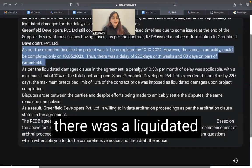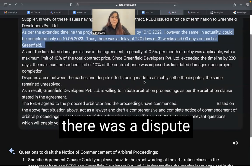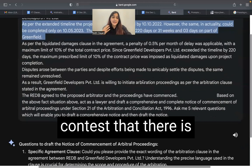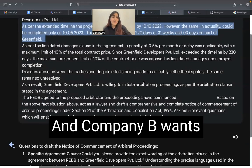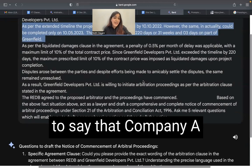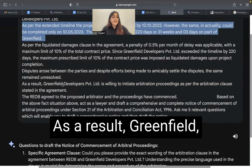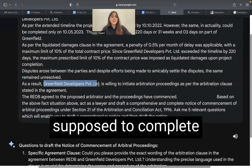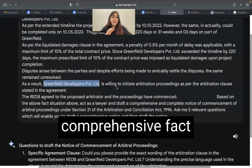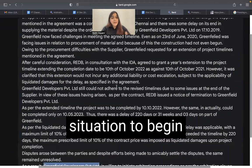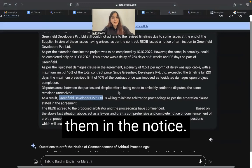This resulted in delay of the project. As per the agreement, there was a liquidated damages clause and a penalty clause, leading to a dispute between the parties. Company A wanted to contest that the delay was due to the fault of suppliers and other parties of Company B, while Company B maintained that Company A had delayed the project. As a result, Greenfield — the party supposed to complete the project — decided to initiate arbitration.